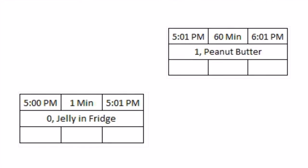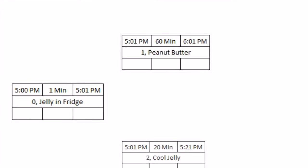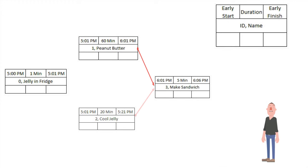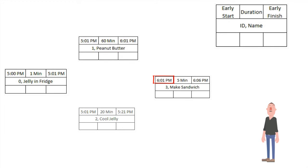Now let's look at picking up the peanut butter. We can start picking up the peanut butter at 5:01. It's going to take one hour to pick up, so 5:01 plus the duration gives us an early finish time of 6:01 p.m. Making our sandwich is tied to both our peanut butter and letting the jelly cool — we can't start making the sandwich until both of those are complete. So the earliest we can start making our sandwich is whichever of these activities finishes last. Getting the peanut butter finishes at 6:01 p.m., so our early start for making our sandwich is 6:01 p.m. Then it will take 5 minutes to make our sandwich, leaving us with an early finish date of 6:06 p.m.